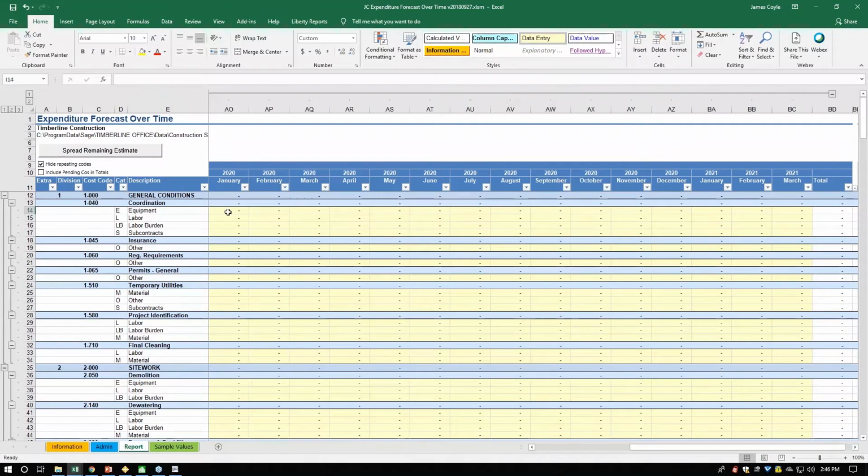Well, remember I showed you that forecast workbook that had one amount, and I told you what that person wanted us to do? Here you go. They could put in their projected cost by month. So they're breaking out probably their estimate as to when they expect to expend those funds. They put those values in here.